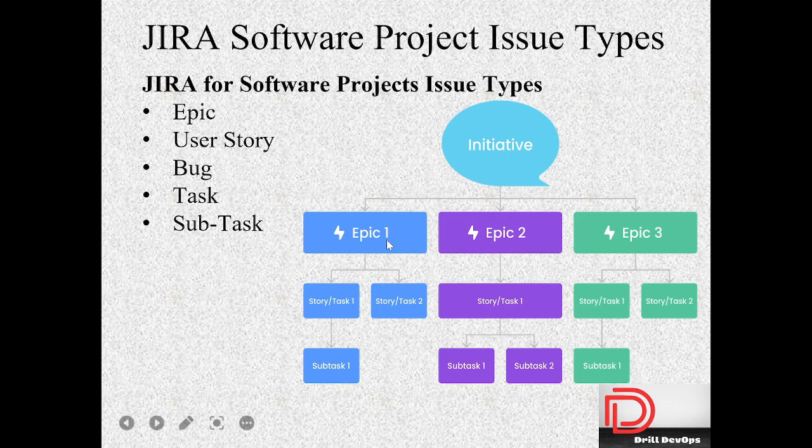If you take that as an example, that entire requirement is broken into pieces of epics, and each epic will have certain features that need to be developed over a period of time. So epics represent a large body of work or large pieces of requirements that can be broken down into user stories, which you can see below. Story means user story. A story represents a customer requirement expressed as a small feature that can be developed and tested within a single sprint. So all these epics are broken into user stories,